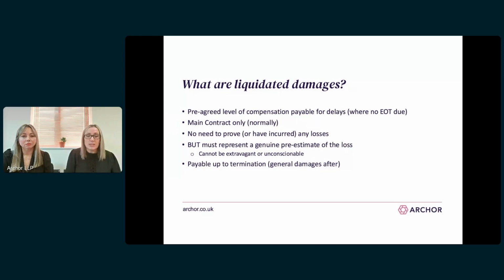It's also important to note that if there are sections in the contract, then liquidated damages should be expressed at a rate that is payable for each section. And when and if a section falls into delay, the liquidated damages for that section become payable.